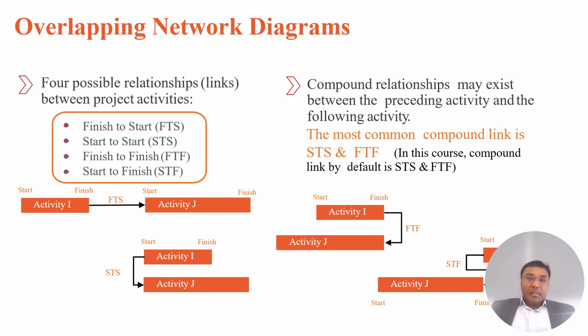The third type is finish to finish. The successor activity finishes only after the predecessor activity finishes. The successor activity cannot finish until the predecessor activity is finished. Activities are in parallel, and this is again common. An example we can think of is testing finishes only after installation finishes. Only after you install a system or a chipboard in an electronic situation can the testing be done, something like that.